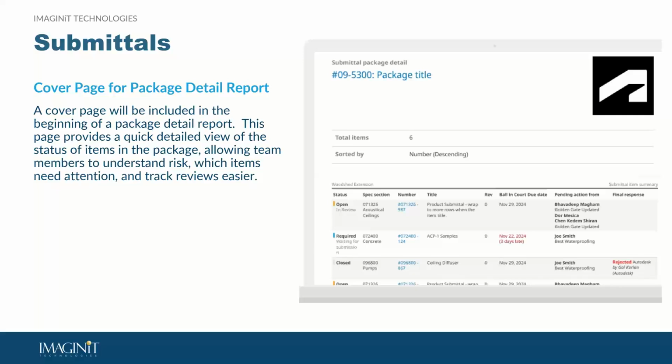So that cover page is going to provide a snapshot view of the overall status of the package, the number of items in each of the status categories, and then the key dates and milestones of that entire submittal package, as well as any other top-level details that help the team understand where things stand before digging into any of the item-by-item details that they can dive into in the actual package itself.